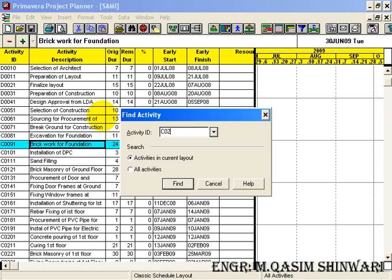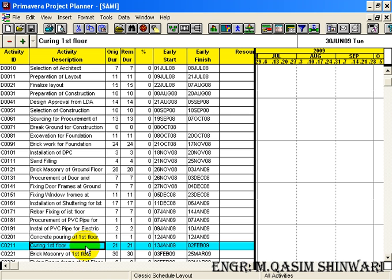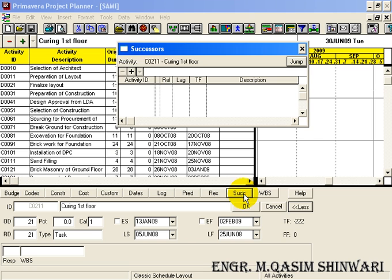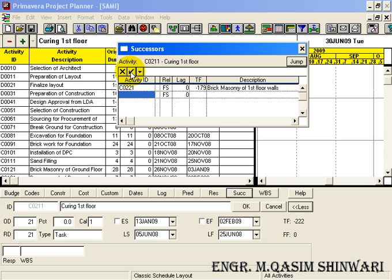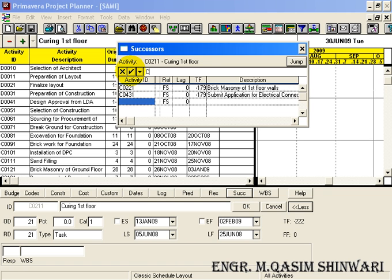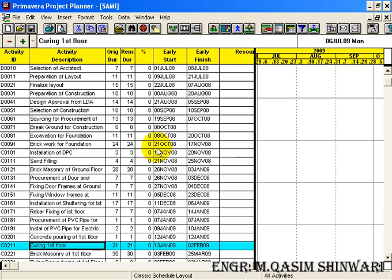Another method is to go to Edit and click Find Activity. I need to find C0211, which is Curing of First Floor. Double-click on it, go to Successors, and add the first successor C0221, the second successor C0431, and the third successor C0451. I am just entering the activity IDs and the description is automatically retrieved. Click OK — all the successors are added.